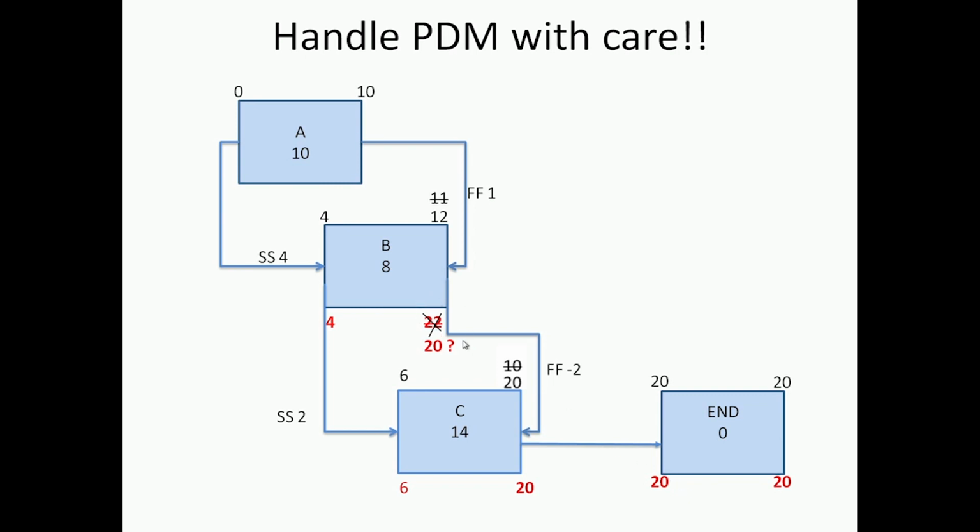One probably common sense way of going about it is saying, this should not exceed project duration. So I go ahead and put 20 as the project duration, the maximum it can be, and continue down with the analysis. If I went back here, 6 minus the 2 goes to 4, and 4 minus 4 is 0, and I proceed this way. Now I am able to get an inconsistency here.